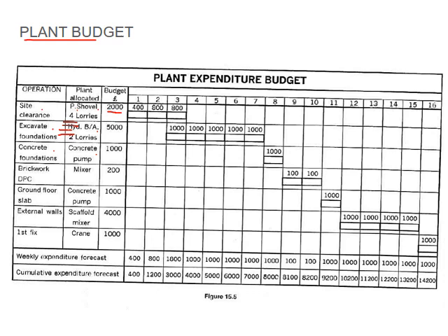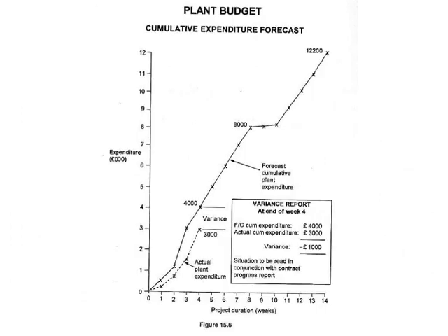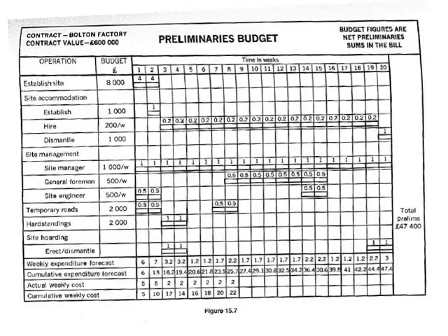In this case it's pounds, but let's say it's 2,000 rand divided in week 1, week 2, week 3, and then you add that and you get your cumulative cost again, like we did in the previous lecture. Okay, and then you plot that again, and you can actually calculate your variance to that. I think you guys will get the idea of this. I'll also try and get you guys to do a little graph like this for me.